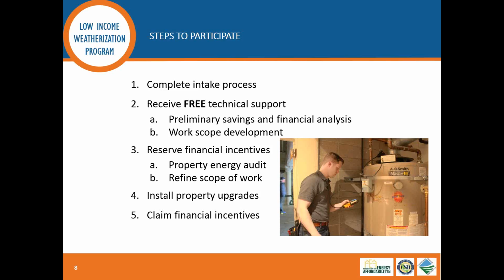During the construction process, we remain in contact with the project team to understand how we're doing as far as the construction schedule is concerned, checking in on milestones, and also scheduling a 50% construction completion inspection that the program provides at no cost to the project or the project team. It's just an opportunity for us to take a look at how things are going and verify that everything is being installed according to the specifications that were agreed upon.